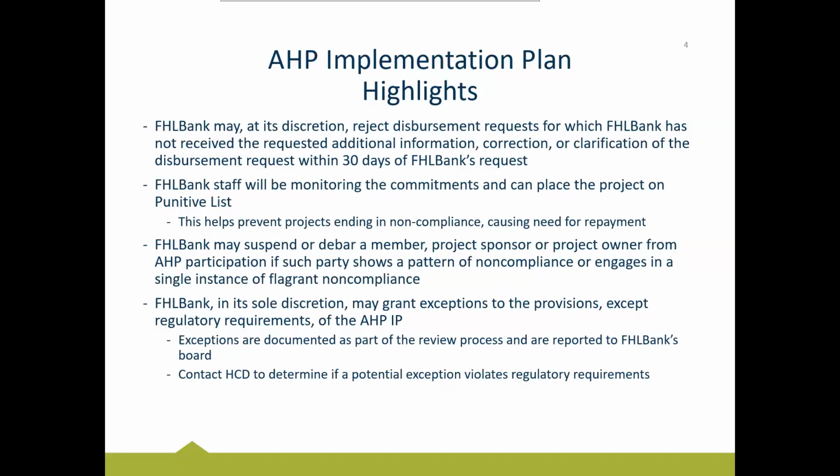There we go. The bank, at its discretion, can reject disbursement requests for which we have not received the requested additional information or clarification within 30 days of our request. Now, before you panic on me, I promise we're not just going to reject things out of nowhere. What this is talking about is if we have sent an email to your organization requesting a specific piece of information and we get completely ghosted, not getting any responses to emails, no response to phone calls. We're just getting no answers whatsoever. Nobody's communicating with us. This is what that's referring to. If we go 30 days without hearing anything, then we do hold the right to reject that disbursement.